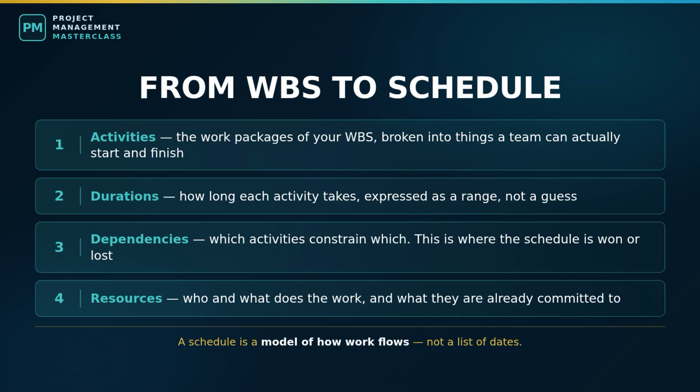When a project is badly late, the root cause is far more often a sequencing problem than an estimating problem. Somebody did not know the permit had to be in before the crew mobilized. Somebody did not know the training environment had to exist before the pilot cohort could run. Nobody asked. It was not on the plan. So spend your time on the logic. The durations will be roughly right. The logic is where the money is.